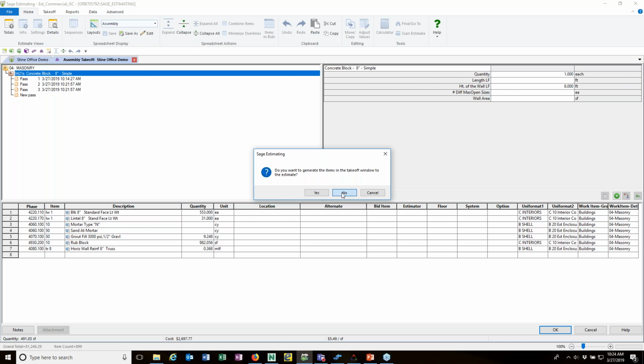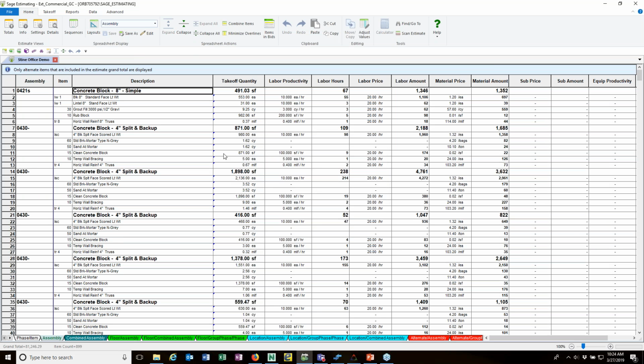Close this and no. So that's our process in Navisworks. You can see that we can go get information into the estimate, no cut, copy, paste, see revision, come back from the estimate into the model, process revisions, and again, no cut, copy, or paste needed. So lots of power there, no fat finger problems, hopefully. And so that's the process in Navisworks.